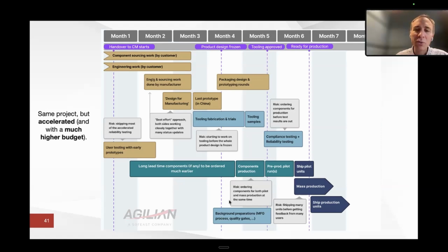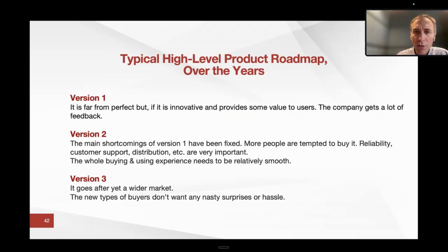So people need to understand risk doesn't just mean, oh, it might cost $5,000 extra. Well, you might lose your whole tooling, which costs $50,000 plus. You need to remake it and revalidate it and so on. And then you need also to change the design first. So in total, you waste 2 months. That sometimes happens.